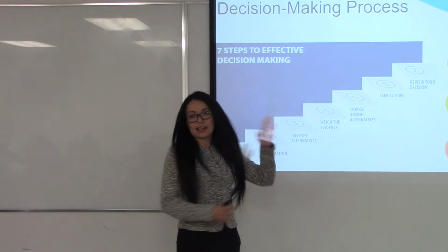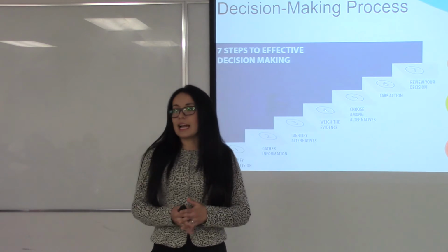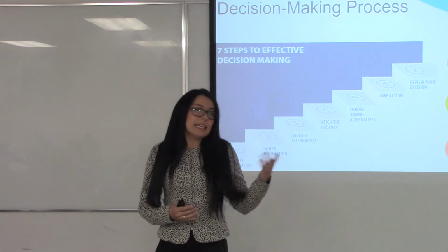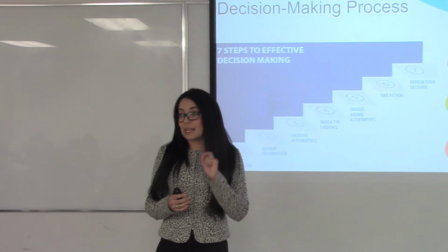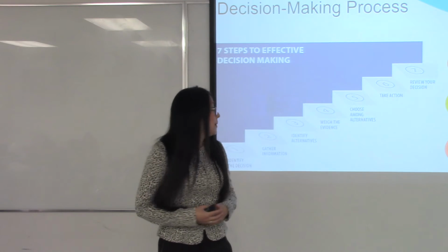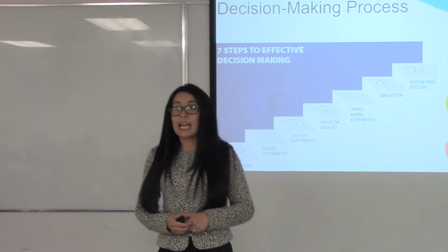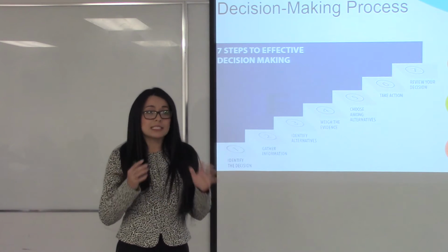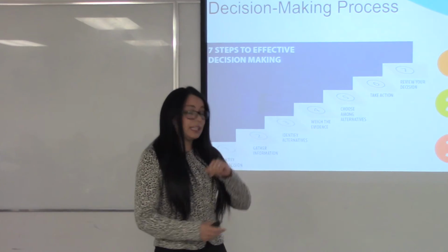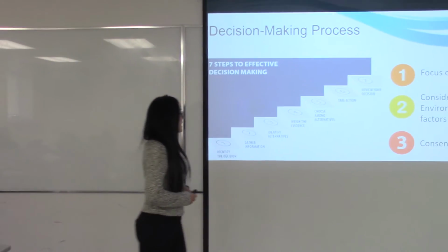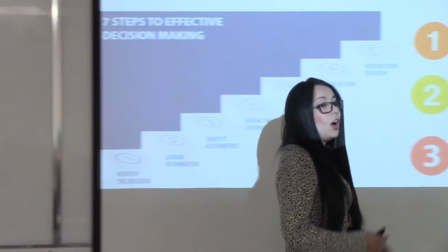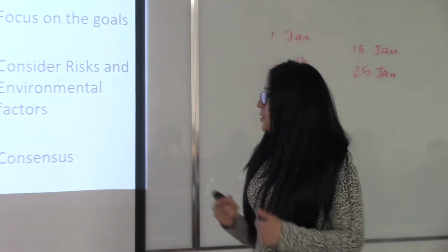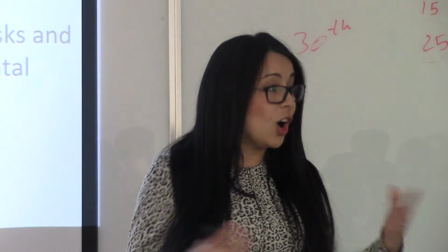Then we weigh the evidence. It was like a cost-effectiveness analysis. For example, in terms of cost, it's better to have only 1 resource assigned to 1 task. But in terms of time, this is not the best choice. So we need to prioritize what was our main thing for each round. Then we chose among alternatives. All the ideas, all the decisions were put to vote. All team members were encouraged to participate openly.